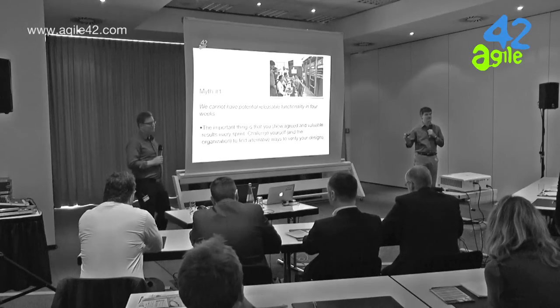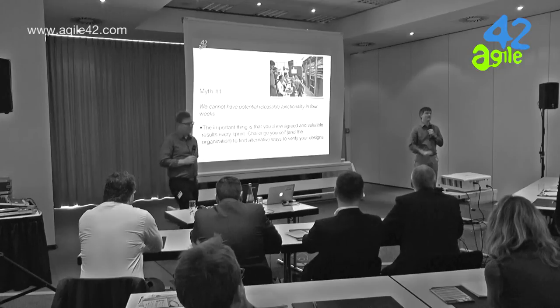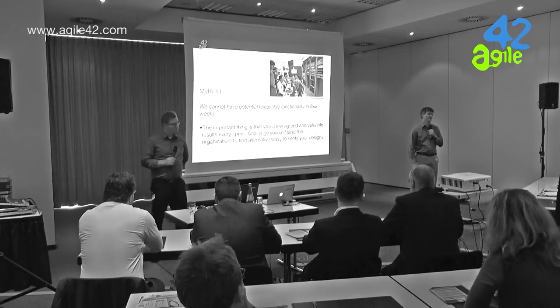You can have sprint goals which are about verifying or evaluating three different DSP providers or three different ways of connecting board circuits, and being able to actually demonstrate, based on some criteria, that one way is better than another because it provides more efficiency, more bit rate, more stability and so on. Okay? So depending on where you are, you have to think, as we said before, in terms of value. And value has always two components. One is client value, and the other part of value that we always forget is knowledge.